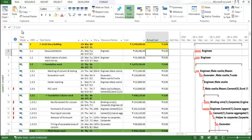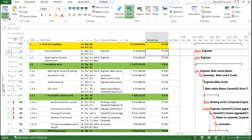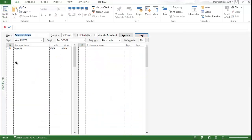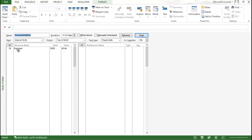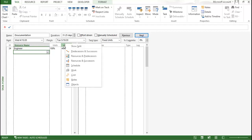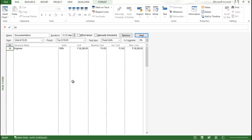For that what you have to do first of all just click here. Go to the task form. If you go to the task form you can see there is an ID of the resources, like at what particular ID it is working. And after that this is a task name for this particular task. What is the resource utilized over here you can see very easily. Now here you can see the percentage completion. But before that it is very important to provide the cost column over here. So, just right click on work and click on the cost.